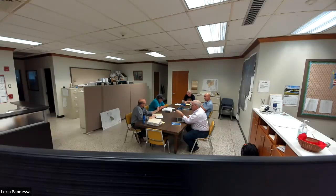Any new business? Could I go back to Willard HVAC? You may. A concept has been put on the table by Arosha, and he asked me to bring this before you guys, about converting the contingencies for Allstate and Newfield, which are tied to the vendors in the financial system, the PO system. They're encumbered. One is to Allstate and one is to Newfield. Arosha's idea, because I think back in the university days when he was working, they had an owner's contingency that was free. You could use it for the existing vendors or new vendors. Now, what that would require would be me to go back to town council and ask, and we've already modified the contingencies twice already.